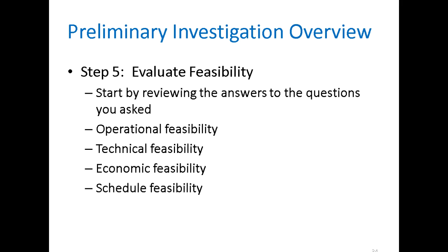And so your project management tools that we're going to be using, like Microsoft Project, lets you enter that kind of thing. First of all, you establish what needs to be done in the project, and you start estimating, okay, this part we think it'll take this many, and typically it goes in man hours. Estimate 40 hours. Let's say, okay, that's a week of work, full time for a person. Well, you might say, well, they're working half time. Well, that means 40 man hours means in the schedule it'll actually take 2 weeks because they're going to be working part-time on our project, half of their other time on some other project.